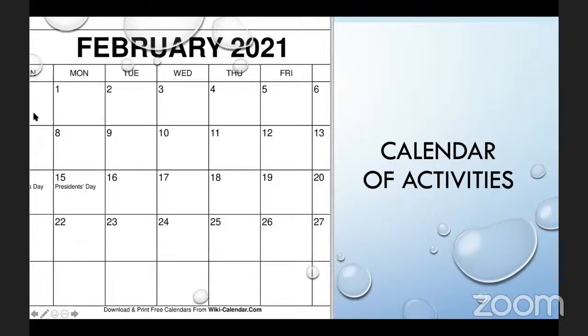Okay, so sprint demo. We have a new sprint in flight, from February 1 to February 12. As soon as the sprint ends on the 12th, we need to demo this to the internal stakeholders, our operational team and whoever the internal stakeholders are. We need to be able to demo what we have done, the set of features that we have developed for the sprint. So the demo session can happen maybe on the 16th. Typically, it needs to happen in the first 2 days after the sprint has ended, so the 15th and 16th, this is where it will happen.